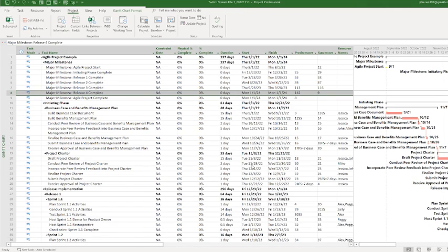There's WBS code, which basically means there's an automated WBS within Microsoft Project that kind of breaks it down for you, but it's not very specific. It doesn't really define the work packages, because it's just like the ID column, where as you delete stuff, it shifts and moves.